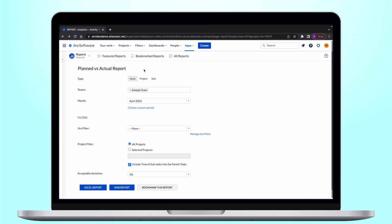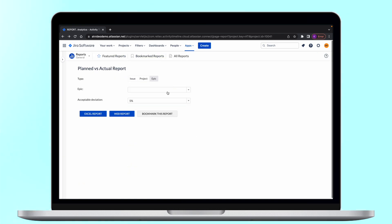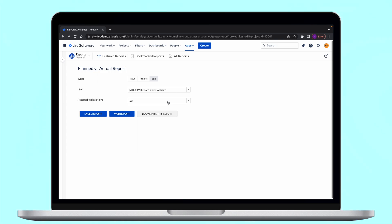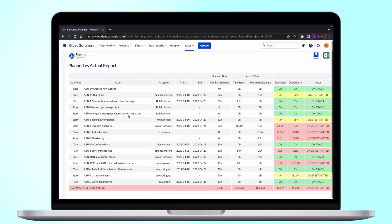In case you use Jira epic functionality you can also generate planned versus actual report to track the progress of the epic which takes into account all of the stories, tasks, and subtasks in any particular epic.